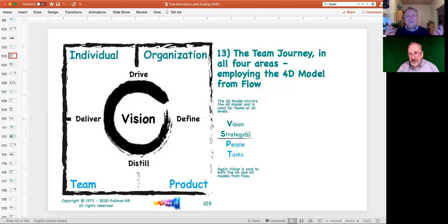And so, from a program view, when you start having multiple methodologies, then it's asymmetric what you're trying to manage. And if you're dealing with asymmetric methods and asymmetric data and asymmetric reporting, it can be a nightmare. And so the scaled agile frameworks try to get all the teams using Scrum, but as you just rightly pointed out, Scrum works well in some instances. In other instances, you're probably not going to use it.